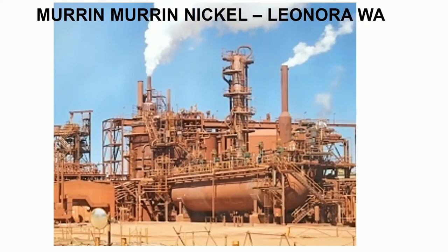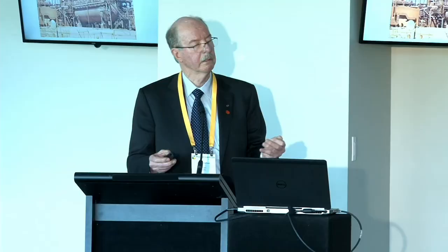At Murren Murren Nickel at Leonora, there was a failure in the first 24 hours of startup — 600-millimetre diameter valves failing. It was a $1 billion job that went to $1.6 billion, a huge commercial failure. The point is they should have modelled the high stresses, temperatures, acid, and pressure in a small laboratory rather than waiting until initial startup to find the valves were inadequate. Today Murren Murren is a profitable organisation delivering 30,000 tonnes per annum of nickel, but they could have been more profitable if they'd done the right thing earlier.